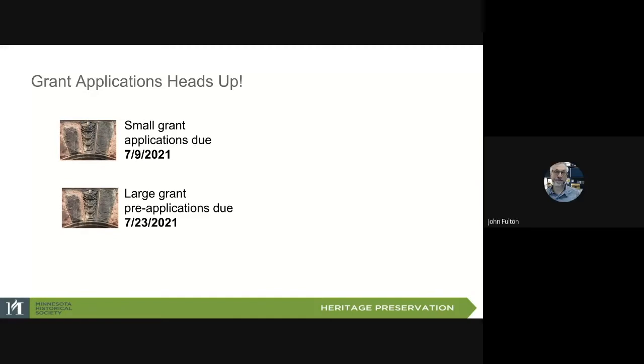And then, when we funded a specs and drawings grant, we often have required milestones of seeing the drawings at 30% completion, 60% completion, and 90% completion.